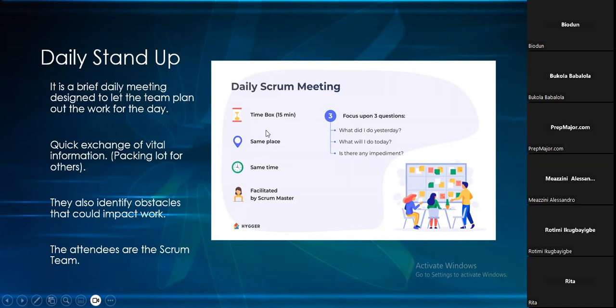It's always good to have it in the same place and at the same time. Please don't keep changing your daily stand-up. My daily stand-up, for example, that's not my timing, I'm just giving an example, is 9:10 to 9:25. So today, Monday, you choose 9:10 to 9:25. Tomorrow, you tell them, you know what, daily stand-up is 10:15 tomorrow. Next day, another time. Before you know, people will start missing the meeting because it is not repetitive.